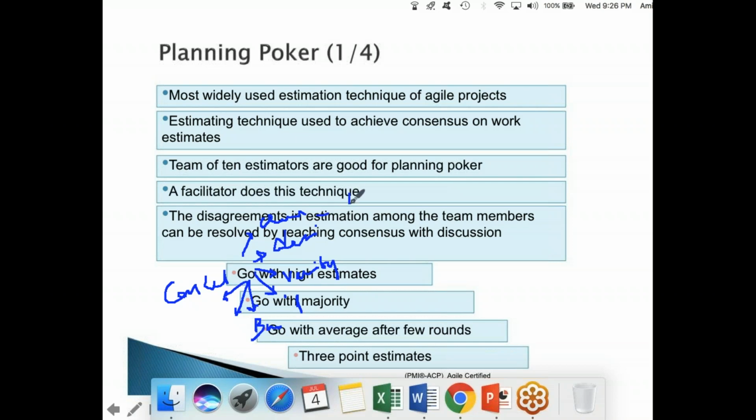So for this, it will take 1 hour. This it will take 2 hours. This it will take 4 hours. This it will take 5 hours, right? This it will take 3 hours. So total for cancel booking, it will take 16 hours. So 16 hours is what it takes. This is done just before the start. Yeah, including testing, right? So this is how they do the estimation on an hourly basis before the sprint.